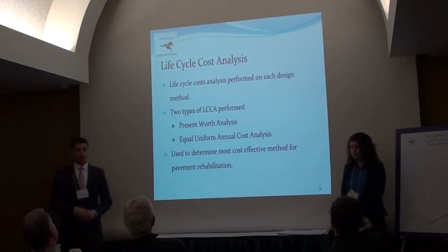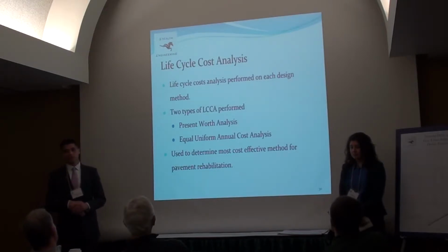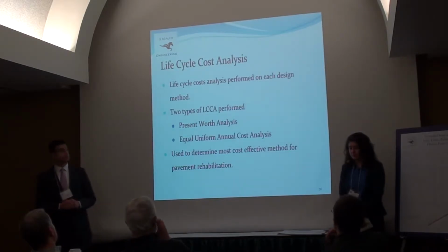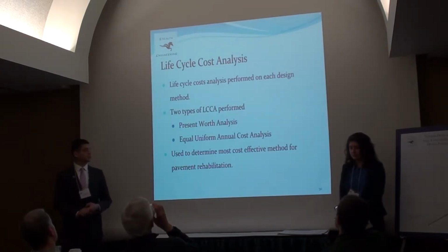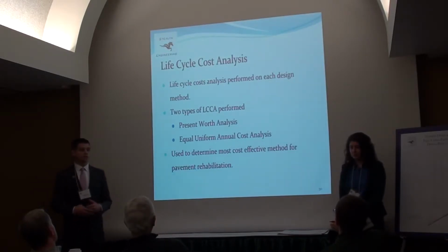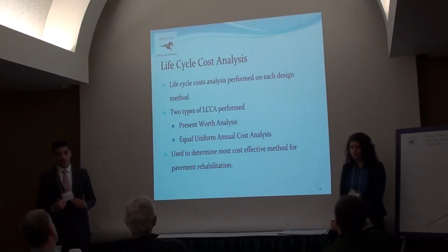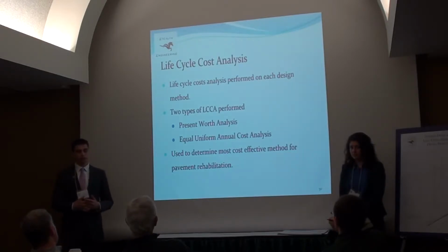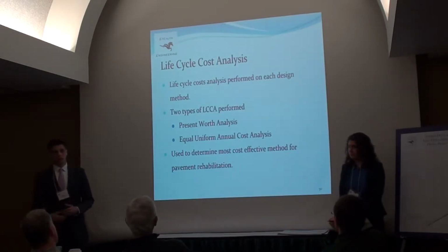Following the design of each alternative, an initial cost estimation was formed, and using this, a life cycle cost analysis was performed on each method. There were 2 types performed. The first was a present worth analysis. This brings all future and initial costs to their present worth to analyze the most feasible option.